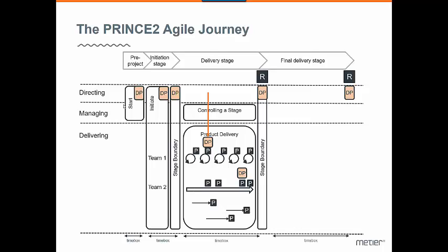And within that time, you kick off together, and then teams plan their work. They do their release plan, basically, for the next stage. And then they also check in with the other teams, look at dependencies, look at how they can solve problems together, how we can manage risks, maybe. And the product manager would facilitate this session. And time boxing it makes really good sense.